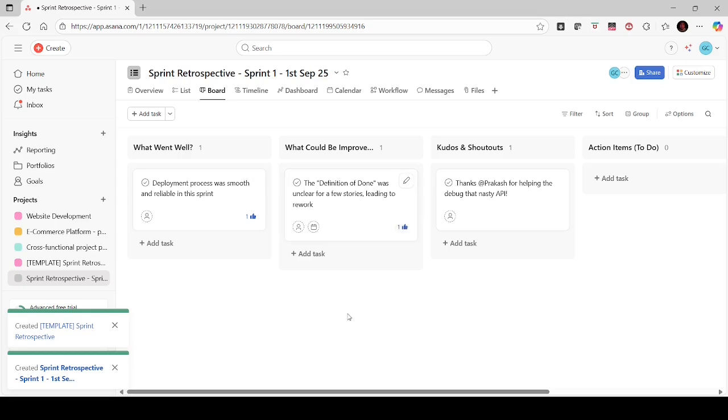So in this way, after the end of this 5 or 10 minutes of discussion and brainstorming, the team will identify the items on which most of the team members agreed that this thing happened, either on the positive or the negative end, and those items will be picked up for discussion. Because you know that every sprint event is a time-bound activity, so we always need to keep everything in time. To avoid any infinite discussion, we need to follow this kind of practice.